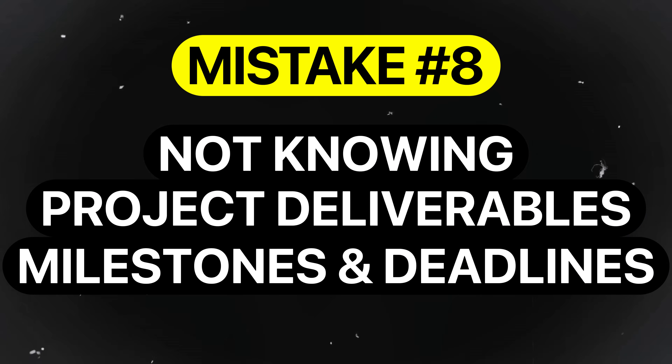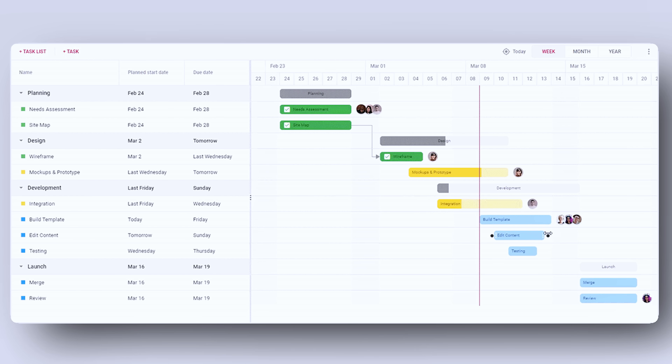Mistake number eight is not knowing project deliverables, milestones, and deadlines. Engineers unaware of program gates and launch schedules prioritize tasks based on personal preferences rather than project needs. For example, an engineer oblivious to project deadlines might spend two weeks refining cosmetic covers while the functional PCB assembly mounting features remain incomplete, jeopardizing the engineering validation test build deadlines. Always align your daily work with critical path items and program milestones to ensure timely project execution.